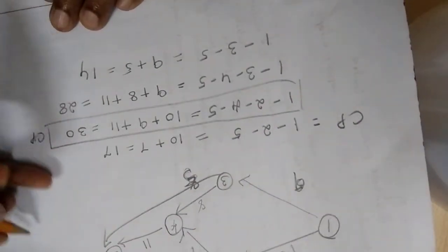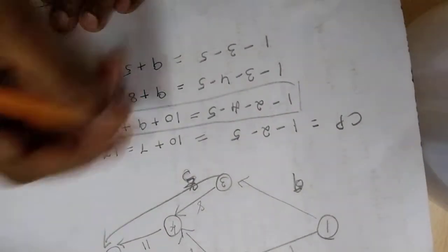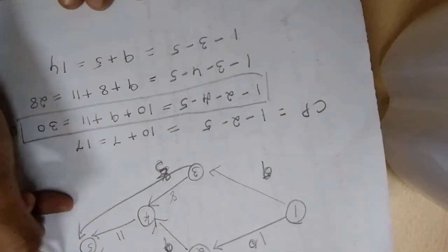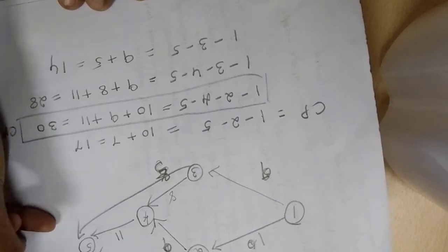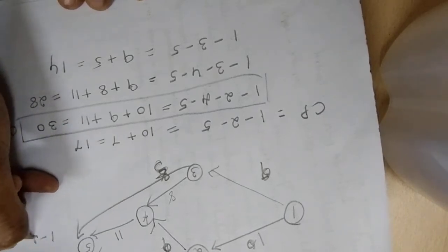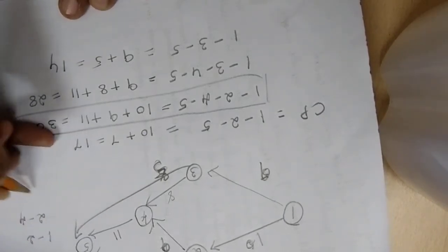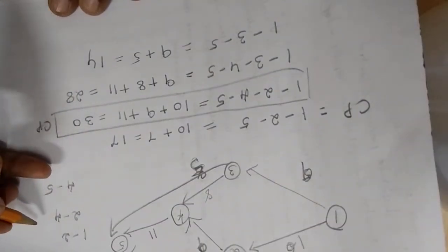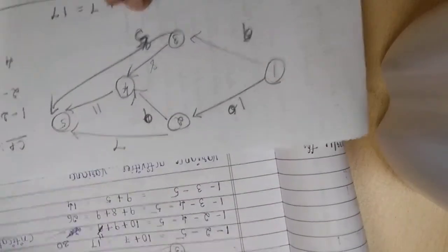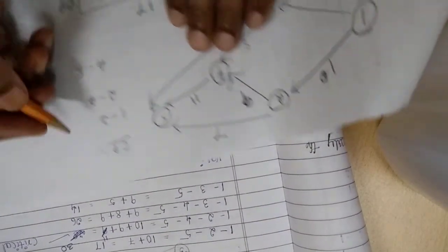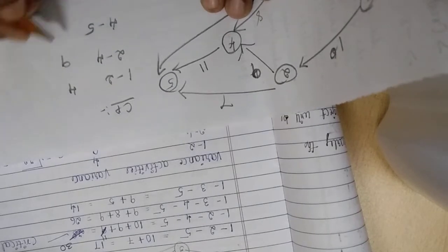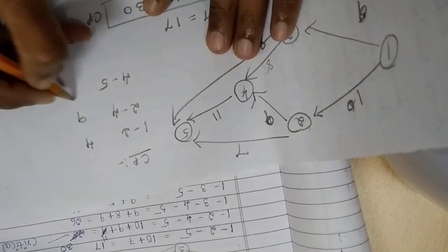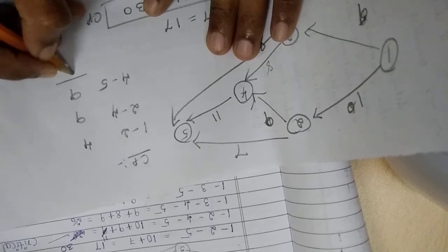So standard normal variate will have to be worked out. What I should do is now I have to take up the variance of the activities, right? So the activities which are there in the critical path are 1 to 2, 2 to 4 and 4 to 5. So corresponding to this, the standard deviation square, that is variance, is given in the problem we have worked out. So that we have arrived at as 4, 9, then 9. So if we add up all the values, we arrive at 22.